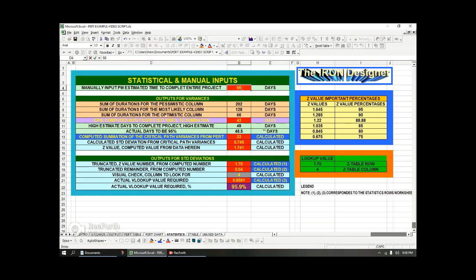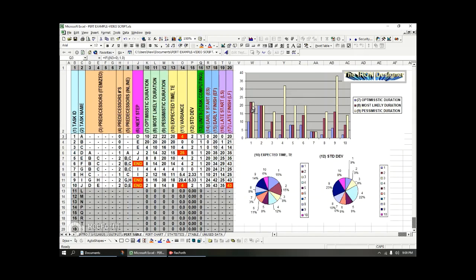If we just did every single task sequentially and totally forgot about working in parallel, we're going to get done in 66 days. But the PM says no. I'll do it in 50, and we give him an 88.7% chance of completing on time.